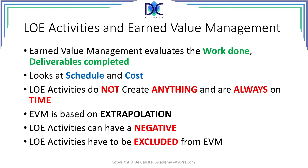Since earned value management is based on extrapolation, we have to exclude those level of effort activities and just consider the information about schedule and cost related to the deliverables. Once the extrapolation is done, we can add those level of effort activities again to the total cost of the project. Level of effort activities can have a negative effect on our earned value management. Imagine that our level of effort is lower than we estimated — it will give us the impression that the project is performing better than in reality.